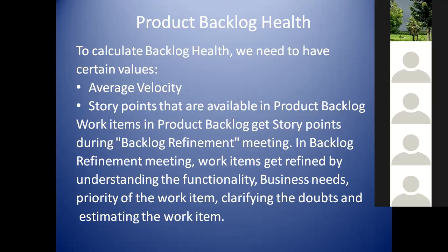When I say health of the product backlog, we should maintain a certain level. What is the disadvantage if you have too many stories refined in your backlog and available for your next 3-4 months? What is the issue? The issue is that we are working on changing requirements. We are working on things that keep having some kind of uncertainty, or things may get changed over a period of time based on the market study, based on the things happening in the trending world.